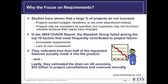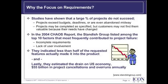Over the years, numerous studies have been conducted to try and determine why IT is not successfully delivering projects. A rather infamous and often referenced survey called the KS Report, conducted by the Standish Group every two years since 1994, has continually listed incomplete requirements and lack of user involvement as the top factors most frequently contributing to project failures. In 1995, Application Development Trans Magazine had an article called The Dollar Drain of IT Project Failures, which referenced the 1994 KS Report and concluded that the top two reasons projects were canceled were incomplete requirements and lack of user involvement.